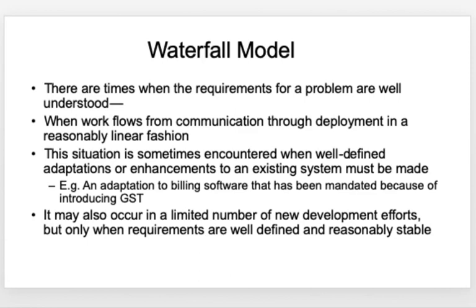This waterfall model can be applied only when the requirements of the problem are well understood. Work flows in a linear fashion, starting from communication through deployment. For example, an adaptation to a billing software that is mandated because of the introduction of GST could be developed using the waterfall model.